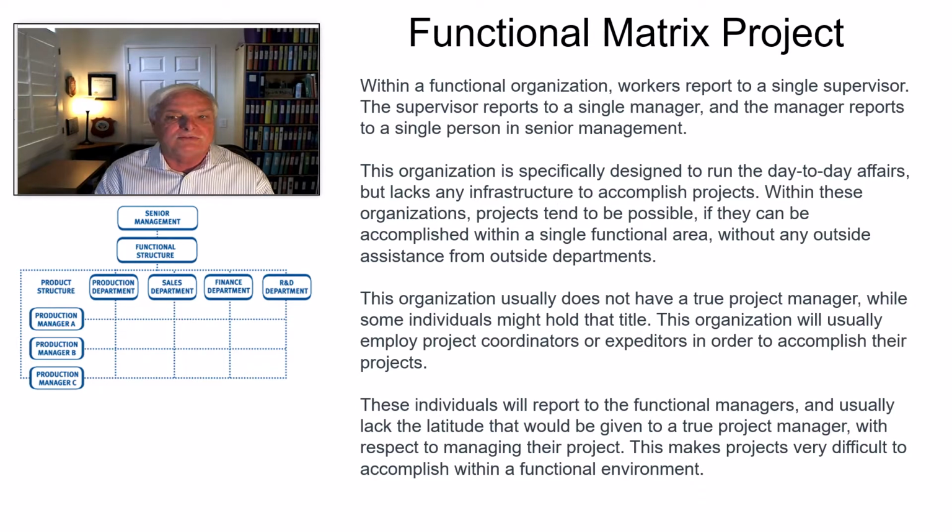This organization is specifically designed to run the day-to-day affairs, but lacks the infrastructure to accomplish a project. Okay? This organization usually does not have a true PM, so there's no true PM assigned to it, but some of the people working in this type of environment may be called that. They may have that title and be called a project manager. The organization will usually employ what we refer to as project coordinators or expediters in order to accomplish these type of projects. These individuals will report up to what we refer to as the functional managers and usually lack the latitude that would be given to a true project manager.